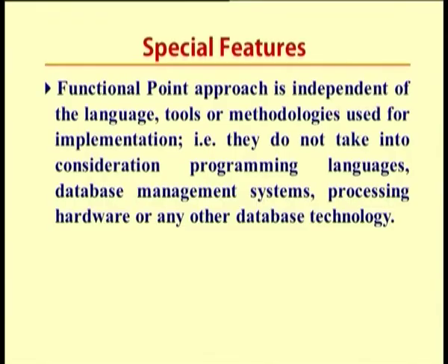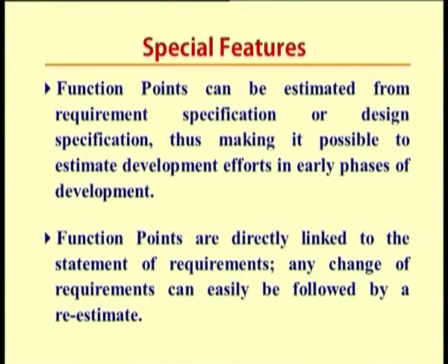They do not take into consideration programming languages, database management systems, processing hardware or any other database technology. So nothing of this type would be involved in the creation of your function point count. Another special feature of function point analysis is that function points can be estimated from the requirement specification or design specification. As I have already pointed out, this particular function point count would be started either before the SRS or after the finalization of the SRS.